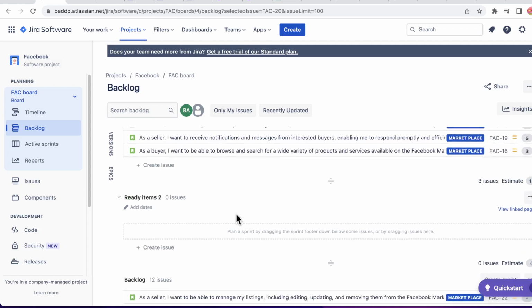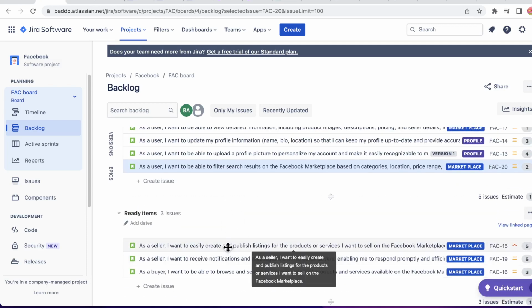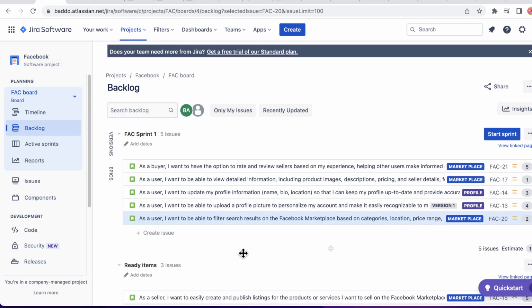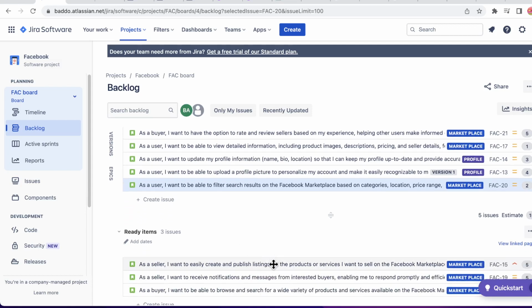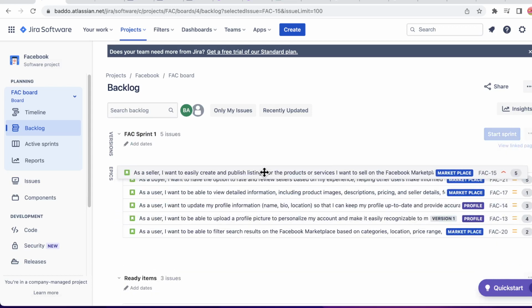It is also not helpful because you have to come back and be communicating on it and be reviewing and revising. So it is done periodically, right? And it is done throughout the sprint. As you are working, you'd also be doing a backlog refinement for the next sprint. So within every sprint, you'll be doing a backlog refinement and backlog prioritization for the next sprint, so that by the time you get to the next sprint, you would already have items that are refined and prioritized, and you can just pick and drop into that sprint.